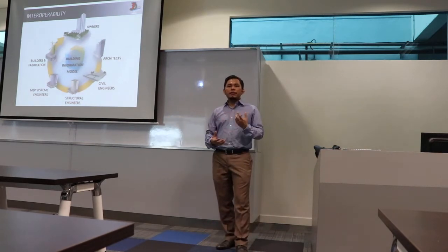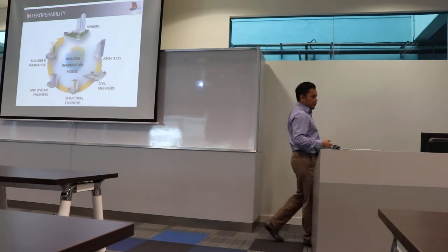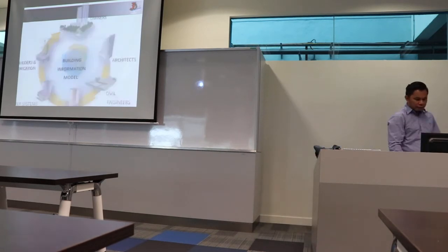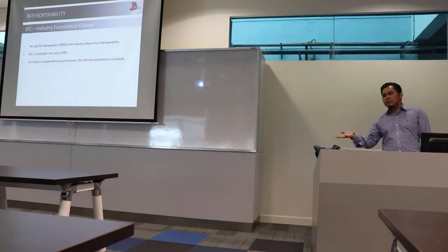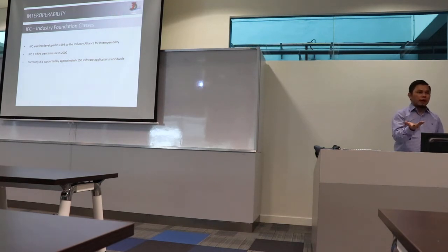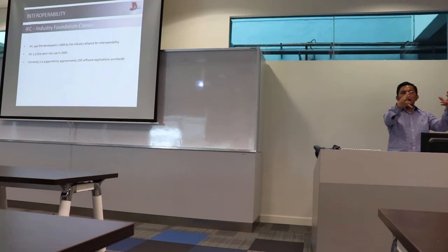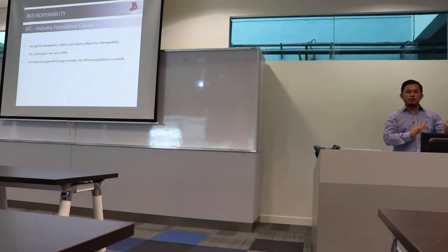So how do we get it together? We have a universal format that you can use, called PDF. For BIM, there is something called IFC, Industry Foundation Classes. Industry Foundation Classes is the file format that is universal for most BIM tools. For some projects, it is becoming a requirement to submit IFC data, so that it becomes an archive that can be used later by anybody with any tools.